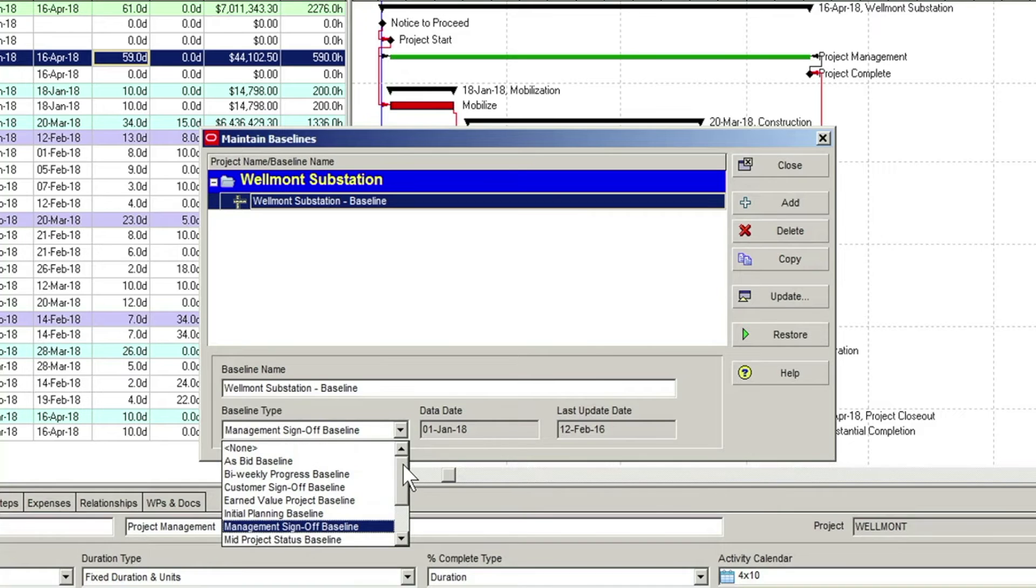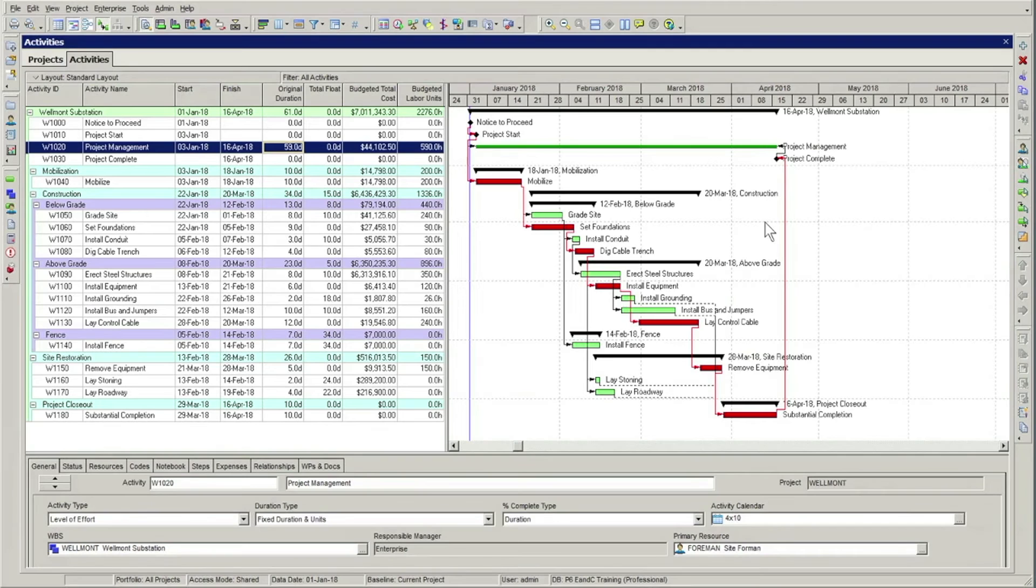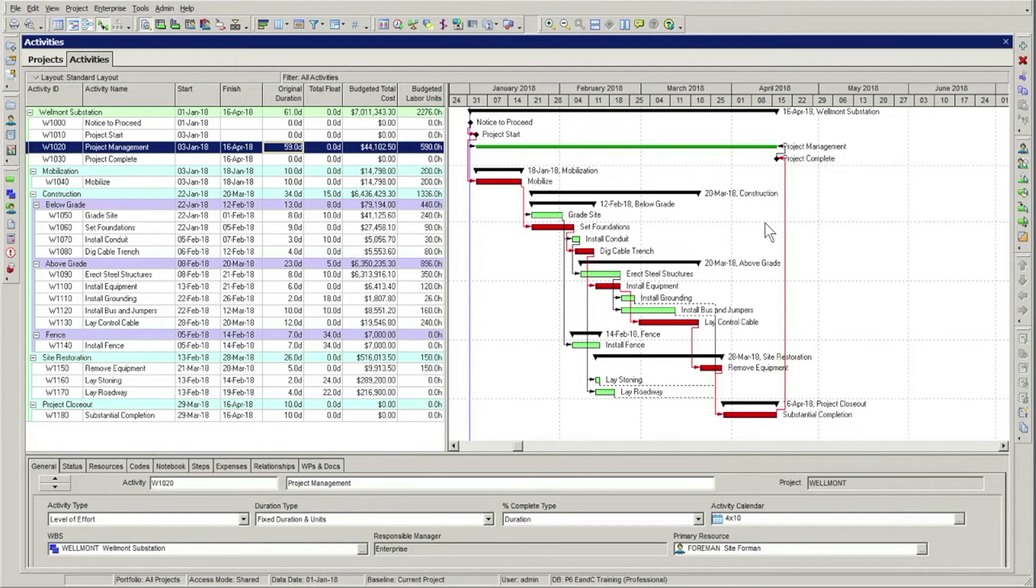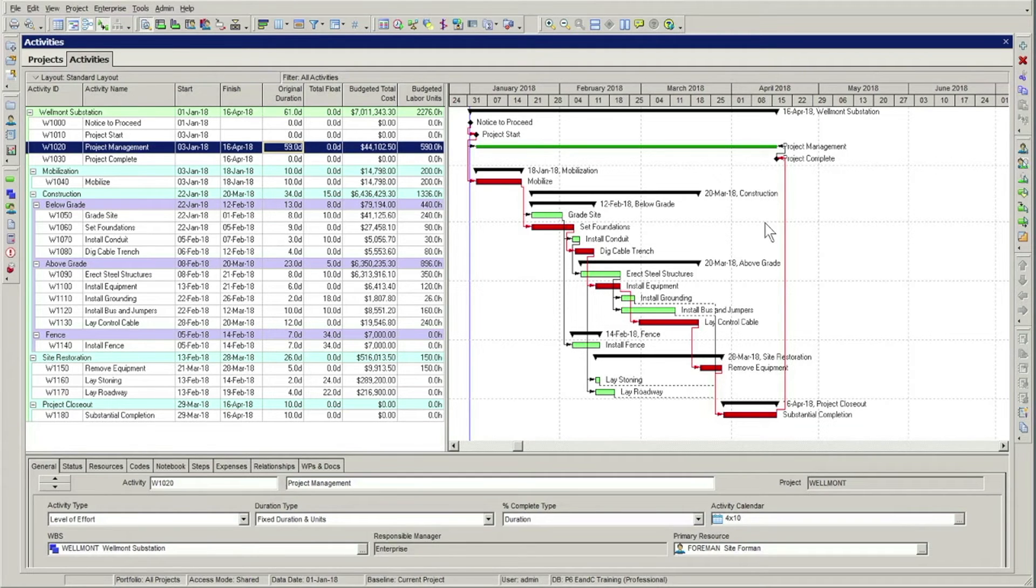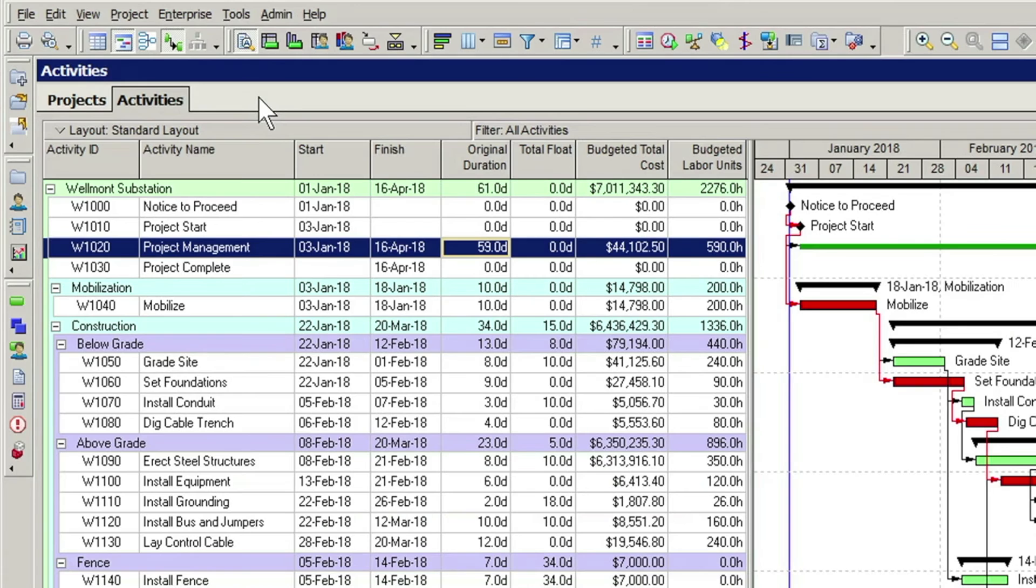The baseline we've just created is actually a full copy of the project in the database. It just doesn't show up as a project in the project view of P6. However, certain items of its data can be seen within the current project once it has been assigned to the project baseline or one of the user baselines. So let's now look at how to assign this baseline to our Wellmont project.